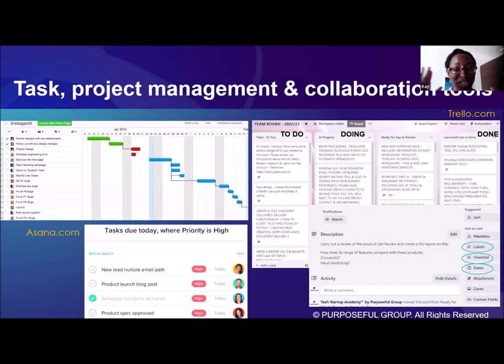So this can be used to manage one person's workload, or we can also have a whole team, and basically we will just assign tasks in a queue to a particular individual. When the person drags the task into the doing or in progress column, we have a real-time view of everything that's in progress for that team or department or part of the project. And then when things are done, we'll see that they've been moved to the done column. And this inset here is just what it looks like when you click into one of these white cards. You can add attachments, you can add links, you can add a checklist view where you can put tasks step by step. You can assign tasks to different people, and you can also assign calendar due dates, and the card will change colour. A little timer icon will appear, and they'll change colour depending on how close they are to the due date. Next slide, please, Erin.